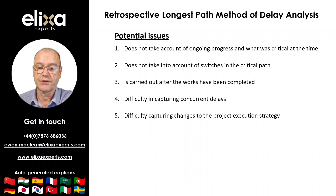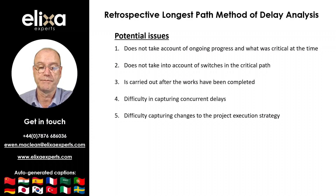In addition, a change to the planned intentions in a baseline program or re-baseline program can alter delay measurements, so care should be taken to measure to a valid baseline program and not an obsolete one.